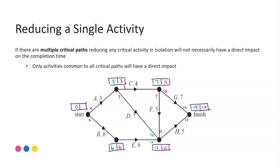In the case where you have multiple critical paths, reducing any single activity in isolation may not have a direct impact on the overall completion time. What you need to be looking for — if there are multiple critical paths — is the activities that are common to both or all of those paths, and they will be the ones that do have an impact.